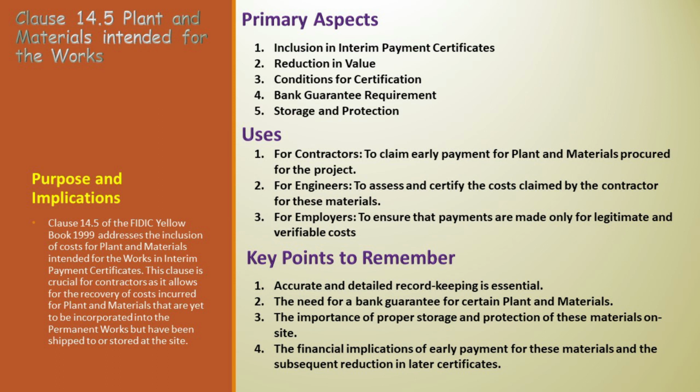To effectively navigate Clause 14.5, several key points must be kept in mind. Accurate and detailed record keeping. Contractors must maintain meticulous records of orders, receipts, costs, and usage of the plant and materials. This documentation is crucial for the engineer's assessment and subsequent certification of costs.